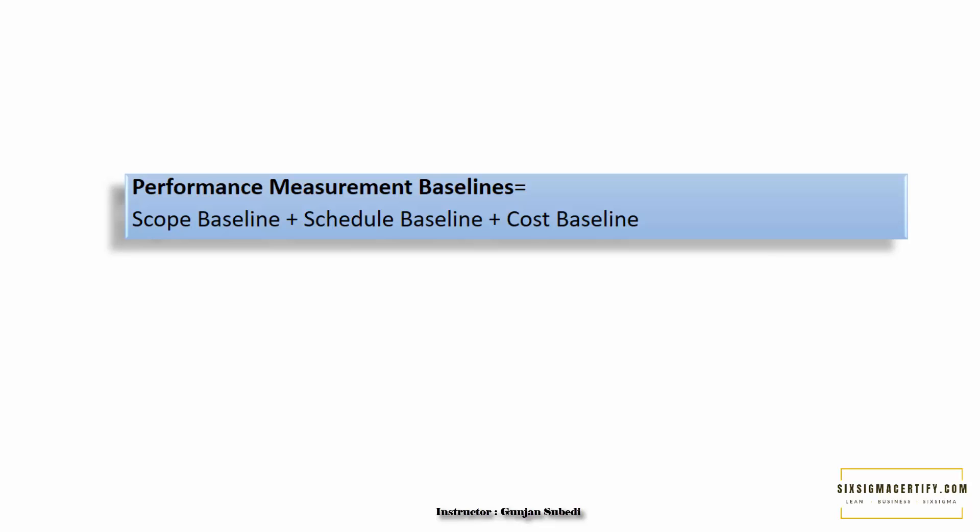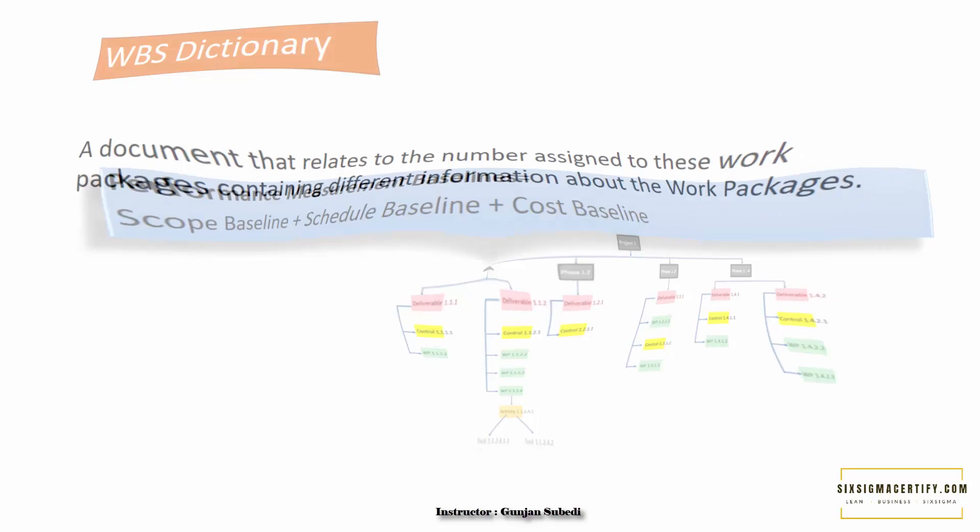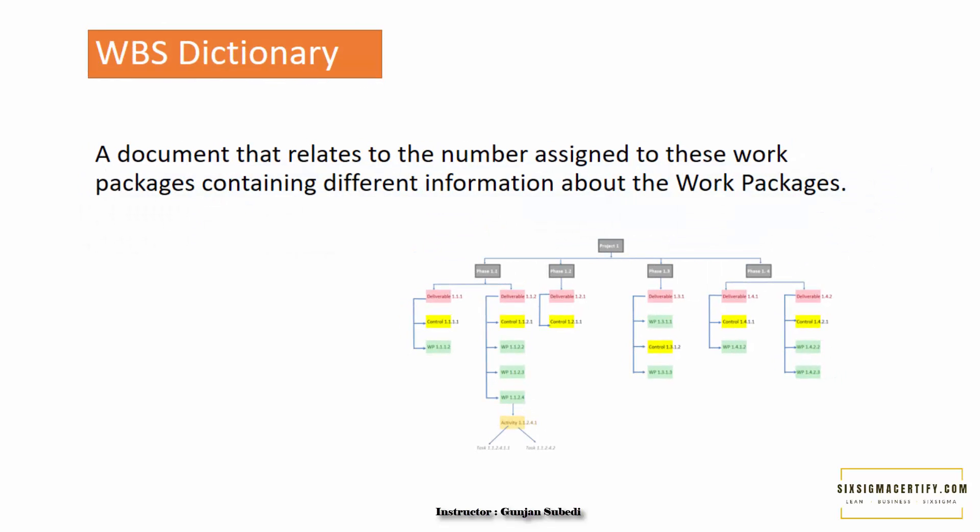We have another term quite similar to scope baseline: the performance measurement baseline, which is the sum of scope baseline plus schedule baseline plus cost baseline. This term can be confused with scope baseline, so take note of the distinction.